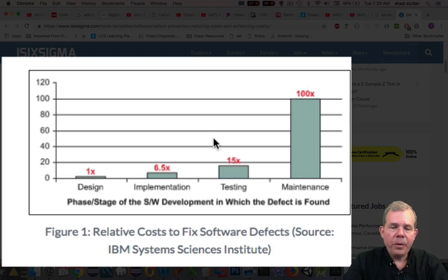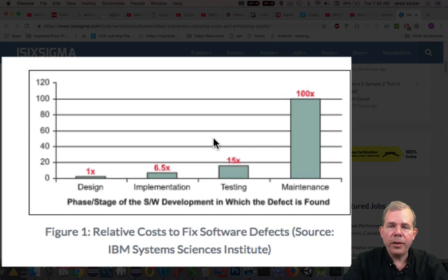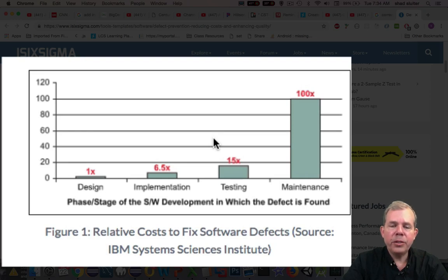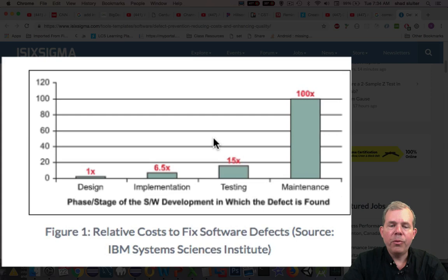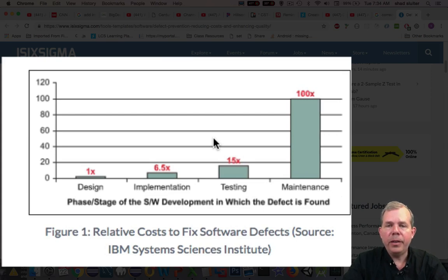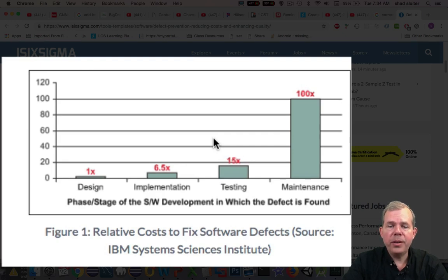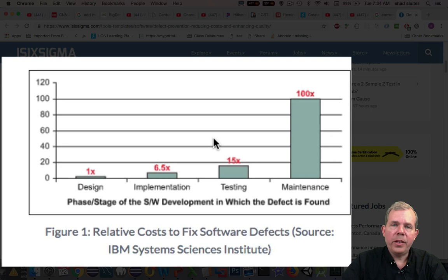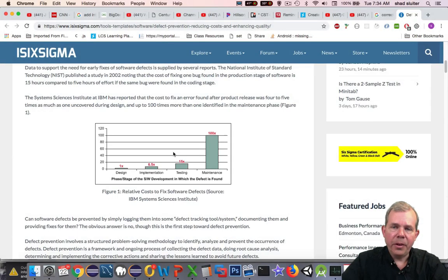If you go into implementation, the cost is six times greater as far as cost to your hours and to your productivity. When we get into testing, it jumps to 15. And if for some reason you've launched the program and you need to make a correction, the cost of correcting it is 100 times greater than if you were to catch that error at the beginning. So design is worth the investment in the long run.